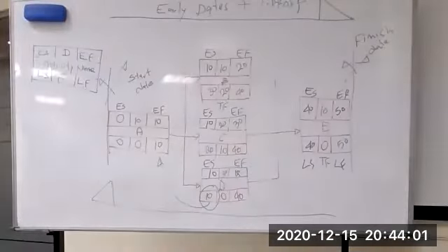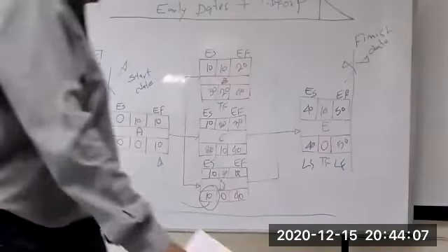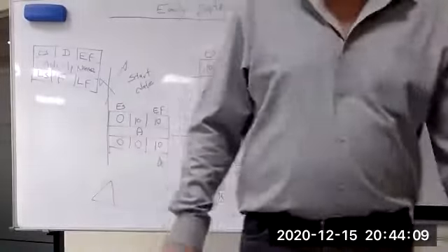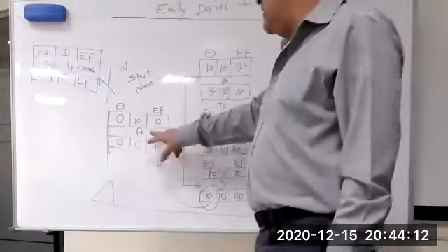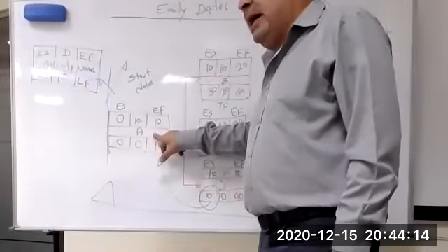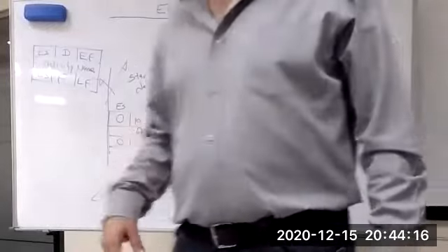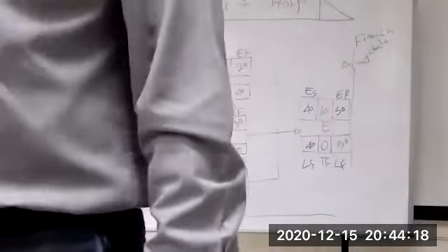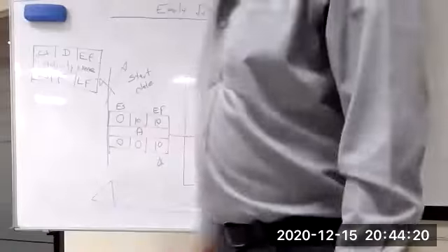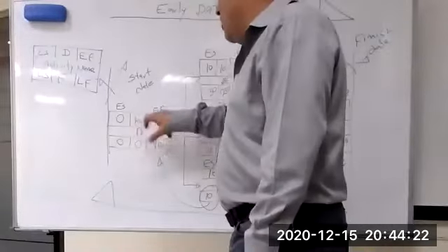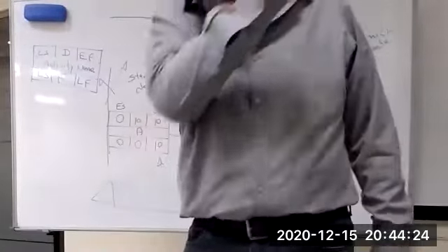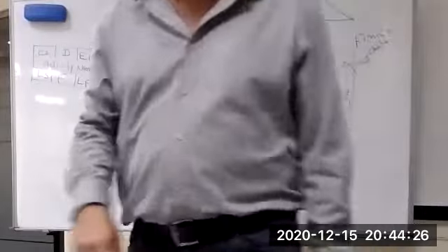Let's go for our slides. Slide number 26. We have the project schedule baseline. Baseline means what? The baseline has all the resources allocated, or cost loading or resource loading, in the program. It means you put all the resources in your activities. And then you have the S-curve. What does S-curve mean?